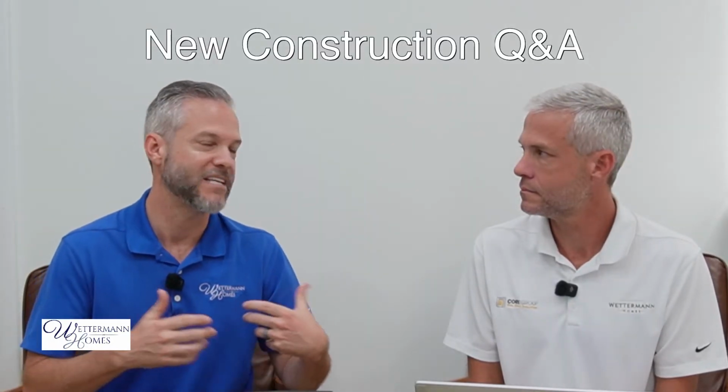Disappointing, but it was. They also said that because of, as Kurt mentioned, fire suppression, you have to engineer the plans a certain way. There has to be bathrooms and this, that, and the other, that they were going to treat it as a commercial build, even though the plans were basically a residential home with a bigger garage space. And so that's when we decided.